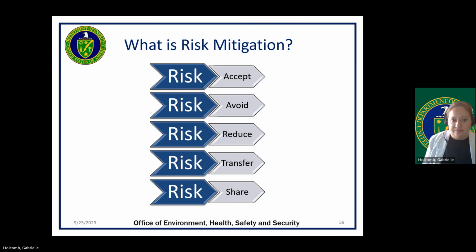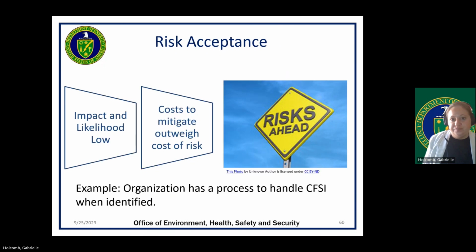Risk acceptance does not reduce any effects. However, it is still considered a risk strategy. The strategy is a common option when the cost of other risk management options, such as avoidance or limitation, such as reduction, outweigh the cost of the risk itself. A company that doesn't want to spend a lot of money on avoiding risks that do not have a high possibility or impact of occurring will use the risk acceptance strategy.